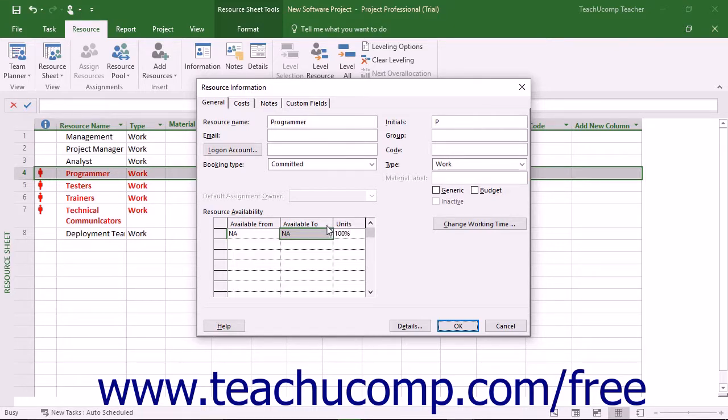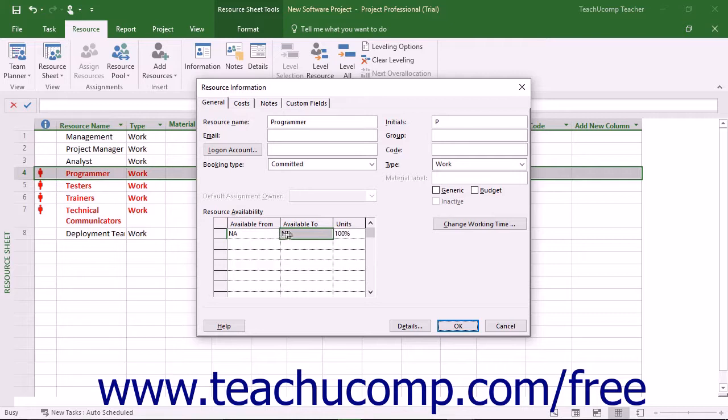Using the earlier example, you would select the dates of the first week of the project and enter 100% availability for the units.